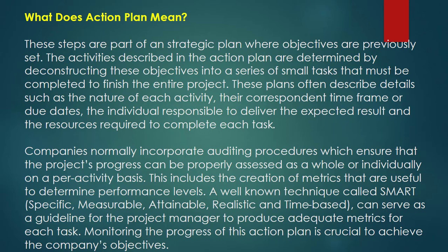These plans often describe details such as the nature of each activity, their corresponding time frame or due dates, the individual responsible to deliver the expected result, and the resources required to complete each task.